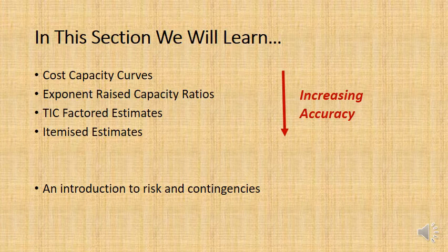And you do estimating for tendering, for getting people in for individual work packages, subcontractors and the like. But you also do estimating for budgeting and tracking to make sure that a project is being done to the scope in terms of the cost aspect. And so generally what happens is the estimates that happen throughout a project get more accurate. But there's a trade-off between accuracy and the energy and money spent and time spent on getting the estimate. That makes sense, doesn't it?